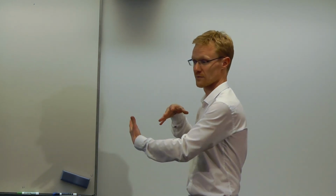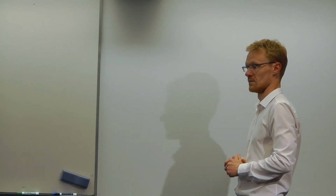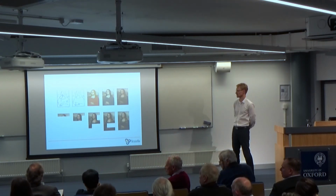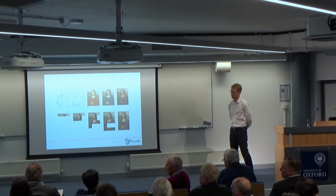When you're incrementing, you're very efficient because you're not redoing; you've worked it all out. But you might not be really effective because it might not be the right solution. On the other hand, with the iterative approach it's the other way around. The iterative thing is prototyping, basically. So you are rapidly making prototypes.